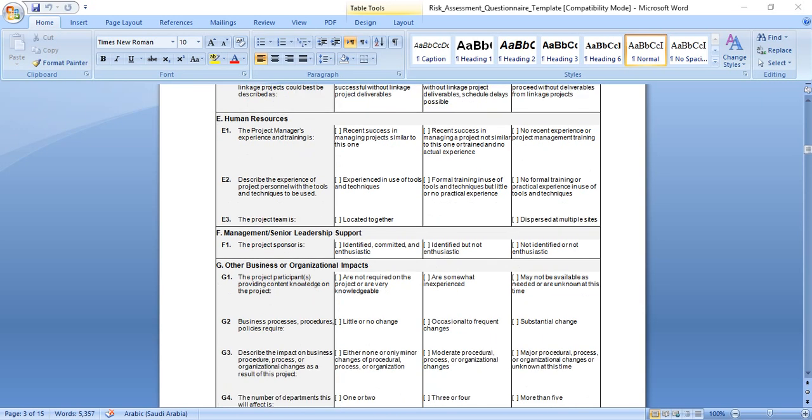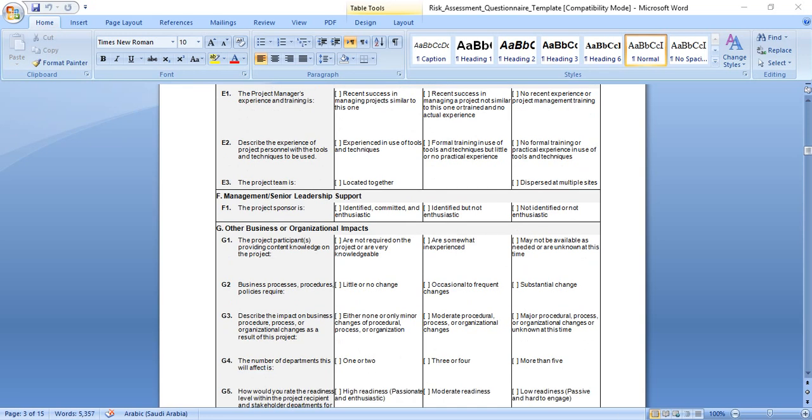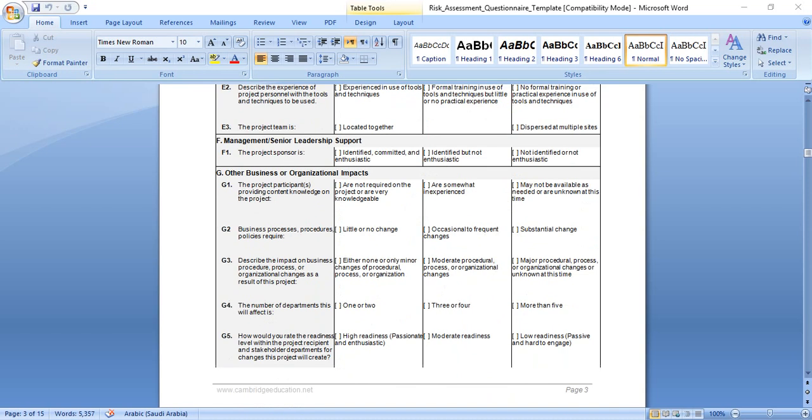Human resources and project manager experience and training: if he has experience, this will be low risk. Recent success in managing projects similar but not identical, medium. He doesn't have any experience, this means high risk. Describe the experience of project personnel with the tools and techniques: experienced with techniques, this will be low. Formal training but no practical experience, medium. No formal training, this will generate high risk. The project team located together, low risk. Disparate, multiple sites, not in the same location, so communication will be more difficult and take more time, this generates high risk.